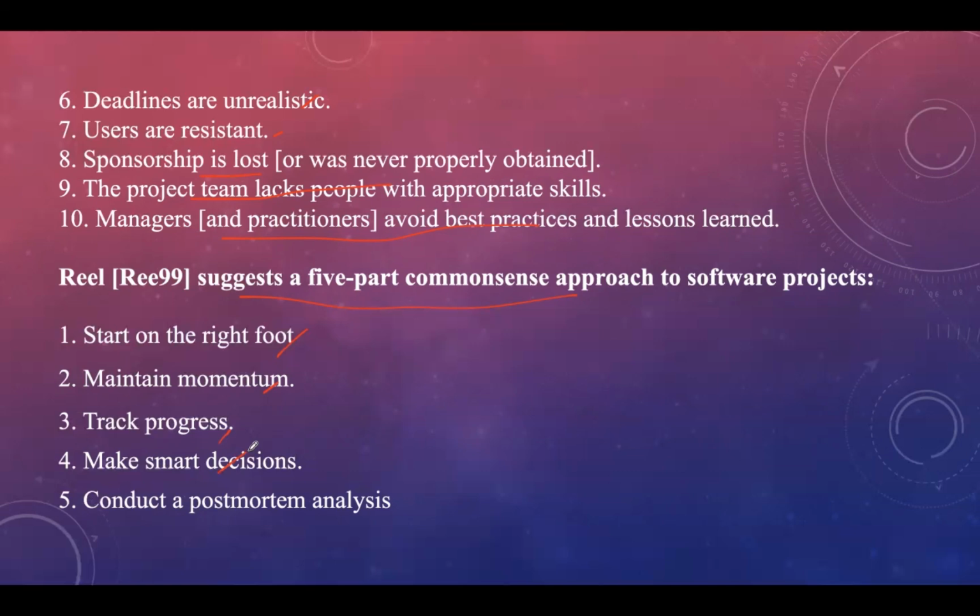Then conduct a postmortem analysis. Establish a consistent mechanism for extracting lessons learned for each project. Evaluate the plan and actual schedules, collect and analyze software project metrics, get feedback from team members and customers, and record findings in written form.